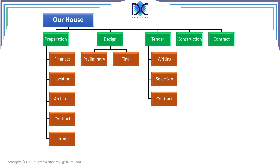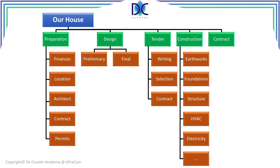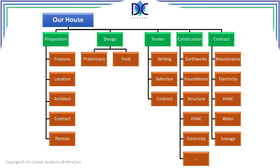The construction itself includes earthworks, foundations, structural works, heating, ventilation, air conditioning, electricity, and many other things you can imagine. At the end, the contract phase involves maintenance of what we built, electricity contracts, heating, ventilation, air conditioning, water, sewage, and perhaps other contracts you have to foresee — for example, contracts related to a swimming pool if you have one.